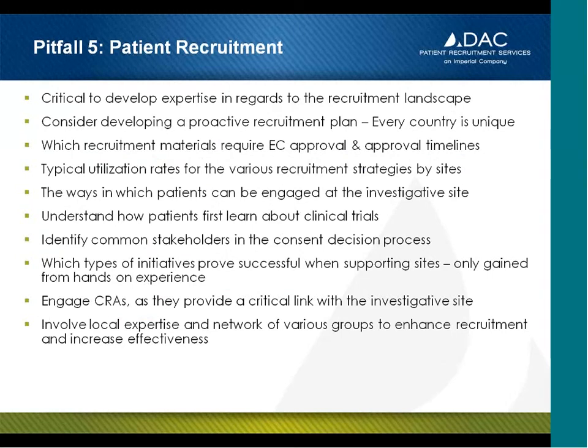Oftentimes, the information gained from the site discussions of recruitment plans exposes trends at the site that is invaluable for study teams to mitigate early on, and even to provide a protocol level fix for sites that are experiencing the same types of issues. The recruitment plan at a minimum should contain a funnel of the major inclusion-exclusion criteria of the study with a prediction of what percentage of that site's patient population will be affected. Dan's going to speak a little bit more about this in detail as we move through this presentation.